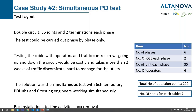There were 35 joints per circuit and two terminations. The test could only be carried out phase by phase because of the very long cable. If we want to go sequential in this kind of test, we need to move so many times and perform so many shots to cover the full length. Every activity is repeated for the number of phases, because we can inject voltage on one phase only.